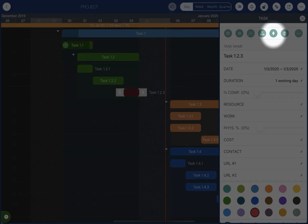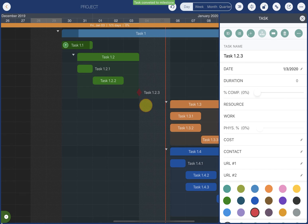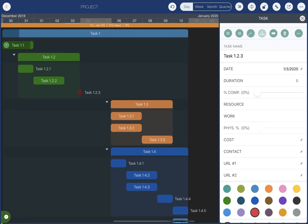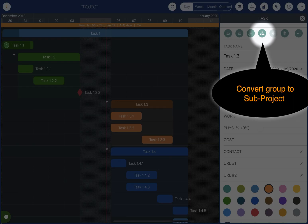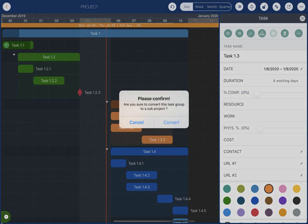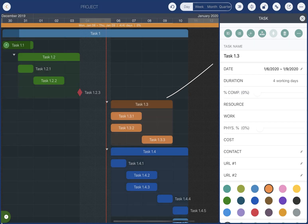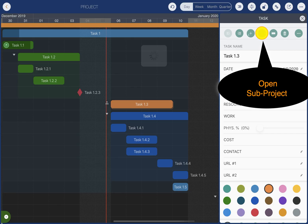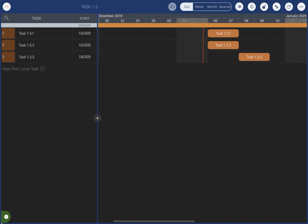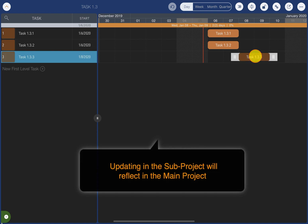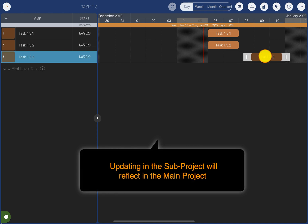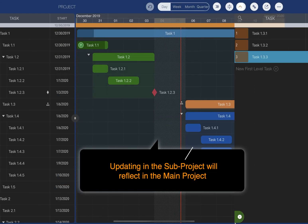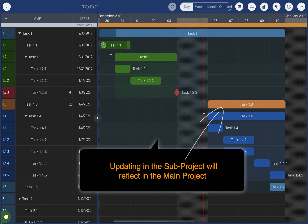Convert a task to a milestone, and convert a task group into a sub-project. Open the sub-project — updates to the sub-project will be reflected in the main project.